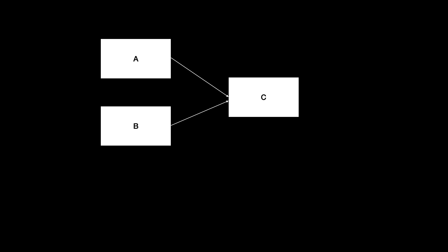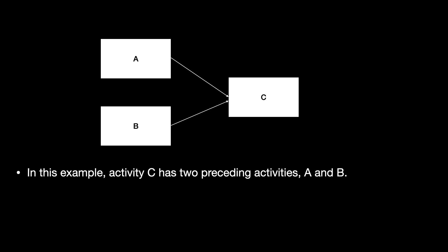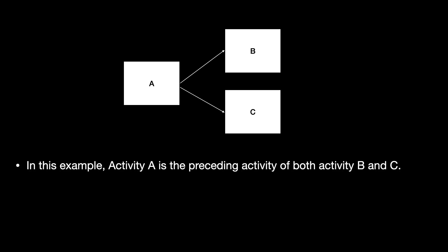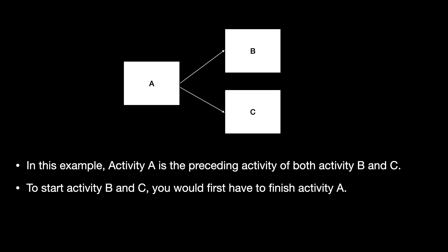If you have two activities, A and B, it is possible that only after both are completed can you go ahead with another activity, activity C. So activity C has two preceding activities, A and B, and you would first have to finish both before starting C. Similarly, right after you finish activity A, you can start both activity B and activity C at the same time, since there is no relationship between B and C. If there were a relationship between them, they would have been connected using arrows.